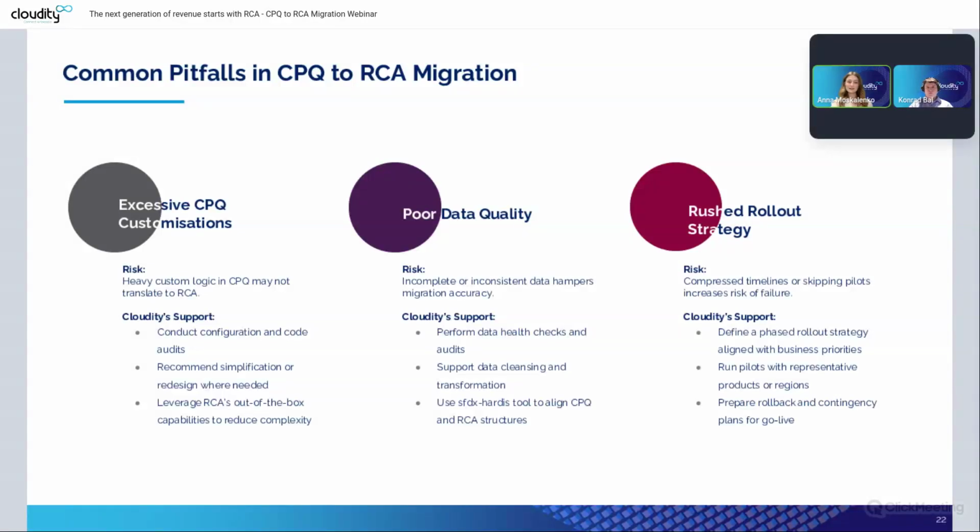The second one is the poor data quality, which again, over the years, data can become a little bit wonky, sometimes because processes could have changed, sometimes because users get creative, right? So a multitude of reasons really, and while this is not always considered when planning a migration project, this is something that needs to be tackled to not bring the old issues into the new setup. Right, and we can evaluate it and guide you through it, utilizing also our migration tool. And I see the question. Let me answer it after the third point.